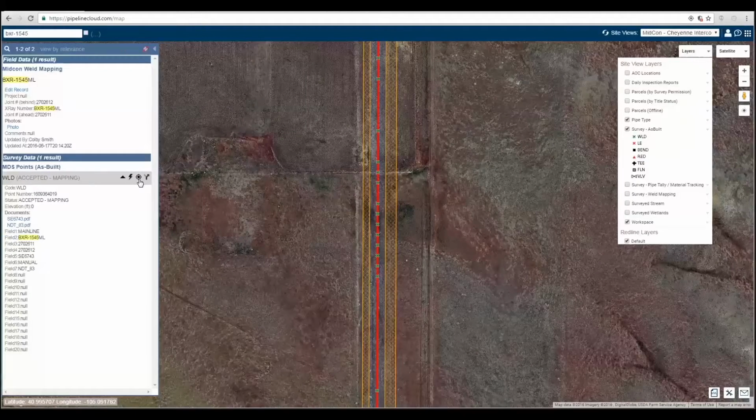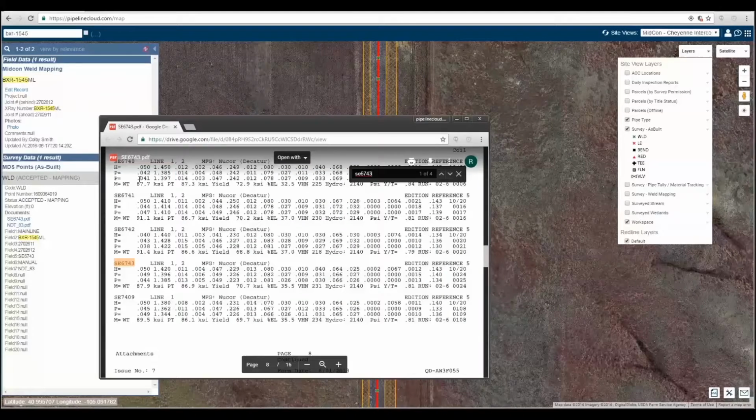as well as conduct context validation, which means verifying whether or not the appropriate material was installed in the appropriate location, and verifying the pipeline is not being constructed outside of the predefined easement. This system will also facilitate associating the necessary documentation, for example, the MTRs or X-ray inspections. For those records that don't pass validation, they will be immediately flagged for further review and resolution.